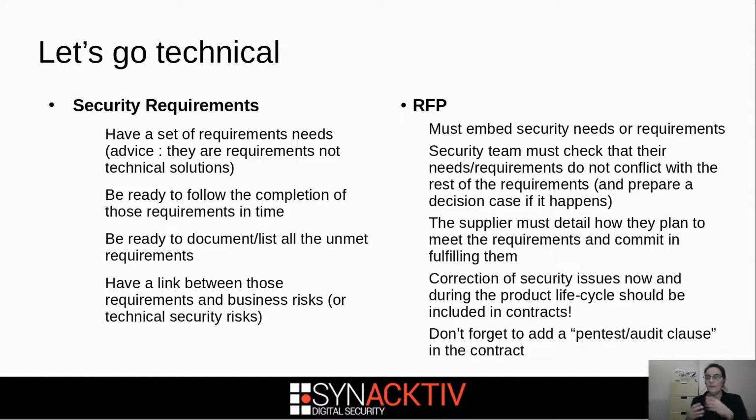Okay? Please, it's now the time to think about two clauses that you have to have in your final contract, and which are always forgotten. First, the correction of security issues during the project life and during the product life should be included in the contract. Too often I've seen people ask for a patch for a public CVE, for example, and the supplier said it's not in the contract, you should pay. Okay, so please put it in the contract from the beginning.